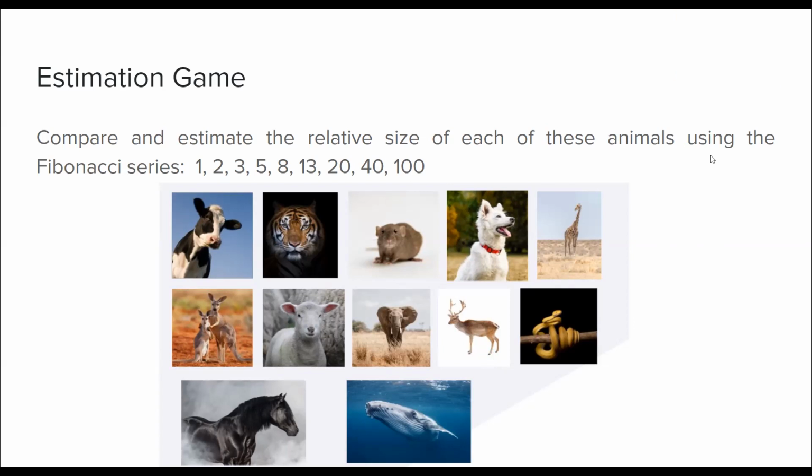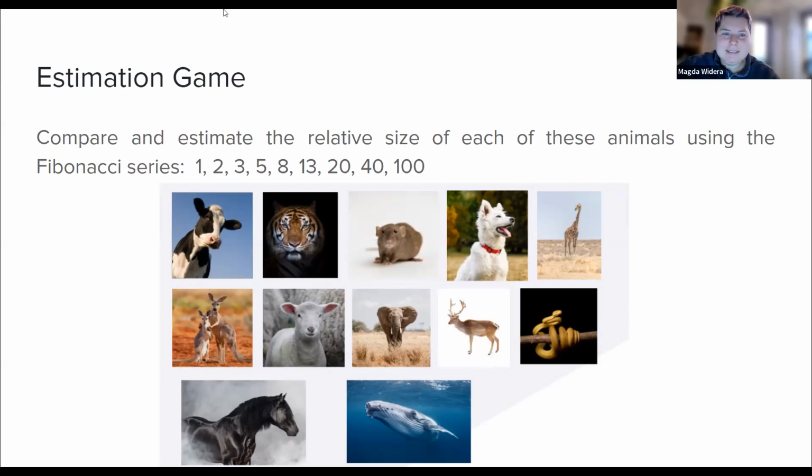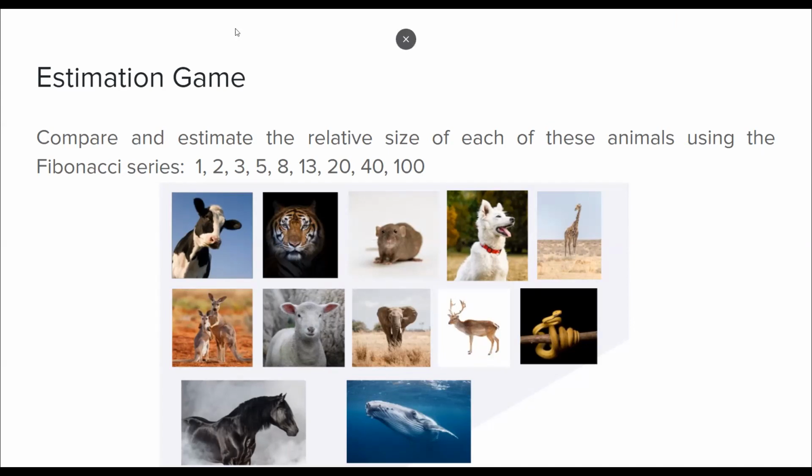Maybe as people do the sorting, I can add one thing from my experience. Yes. You were talking, Magda, about that baseline. What we found very useful is to always have that visible in our estimation, so that people can do exactly what's on your screen. I've got those kinds of things to compare in front of them all the time, to focus on that relativity more than the amount of time, because as you say, it very quickly slips into your mind. Oh, I think it's just a couple of hours or just a small change where I'll tweak a line of code.